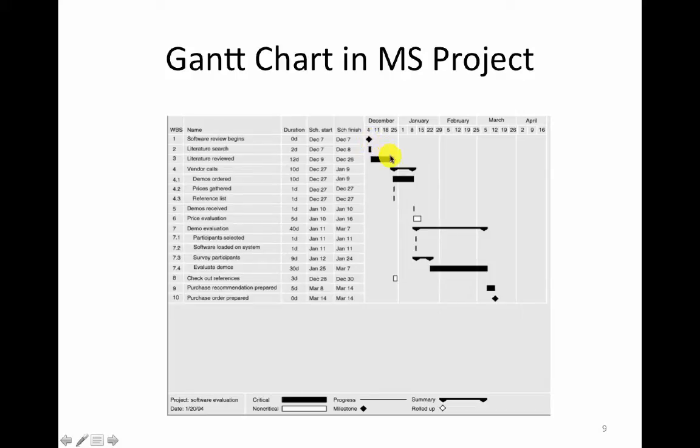Okay. One difference, the thing that you'll see here, is whether it's a critical task or a non-critical task. The white boxes are considered non-critical. The difference is, if it's on the critical path, we'll talk about this later, any delay to that process step or that task is going to delay the overall project. Now if it's non-critical, again the white boxes, one there and one there, then if there's a delay to a non-critical task, it's not necessarily going to add time to your overall project duration.